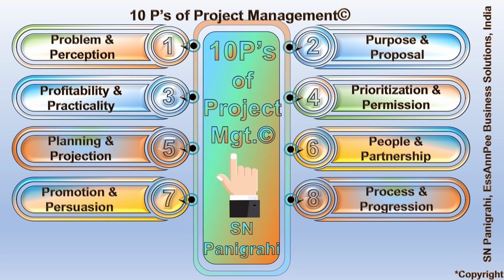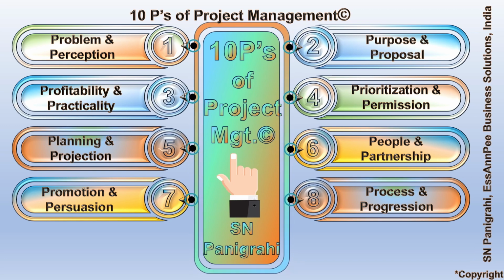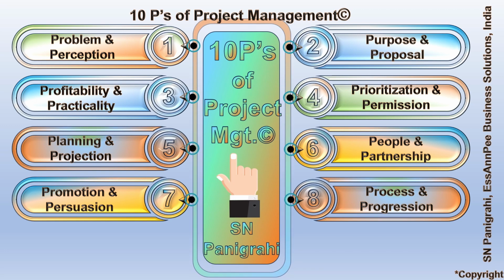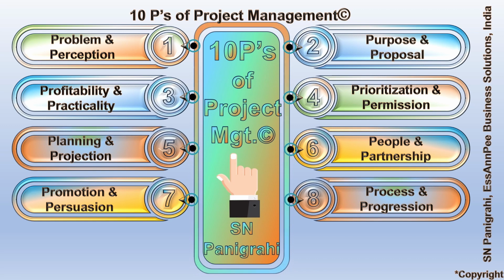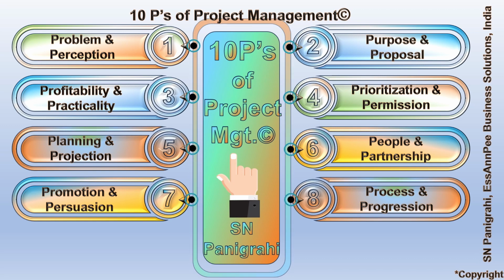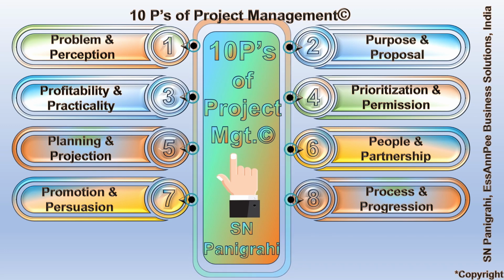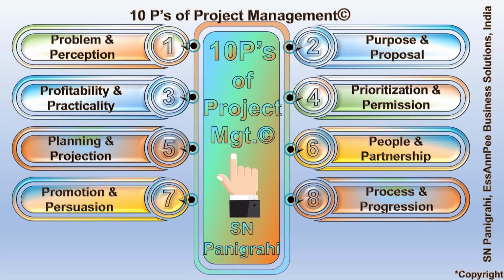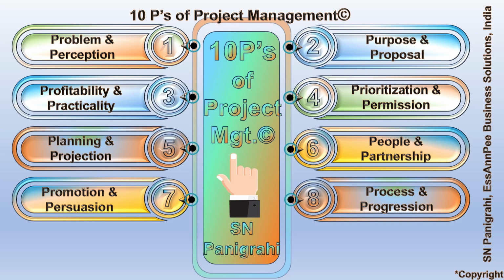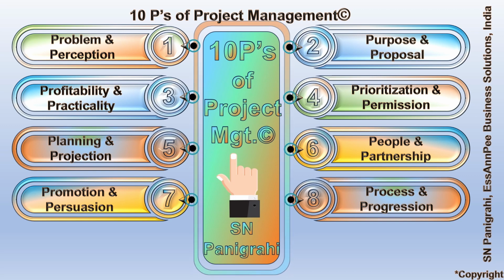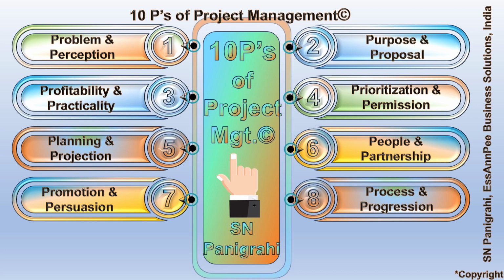Example: implement agile methodologies for execution with defined workflows and communication protocols. Regularly review progress and adapt strategies as necessary to ensure continuous improvement and project success. Adopt Scrum methodology for construction projects, with regular sprints and daily stand-up meetings to track progress and address issues promptly. Continuous improvement is encouraged through retrospective meetings.